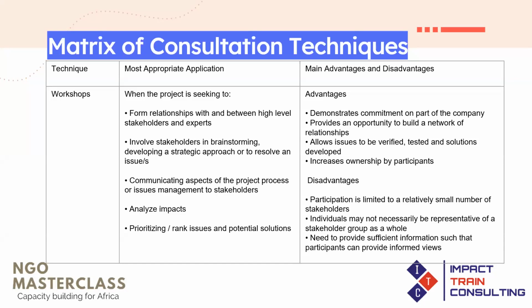You also do workshops when you're trying to involve stakeholders in brainstorming, when you're trying to develop a strategic approach or to resolve an issue. You also do workshops with stakeholders when you're trying to communicate aspects of the project process or issue management to stakeholders, when you're trying to analyze impact, when you're trying to prioritize or rank issues and find potential solutions to the problems you're facing. So you organize stakeholder workshops.